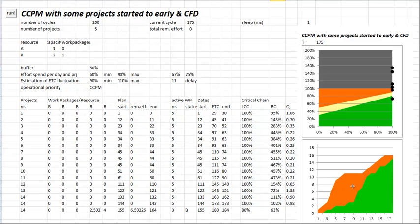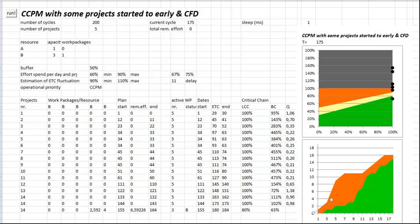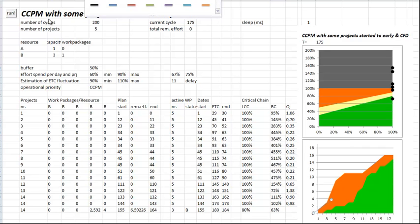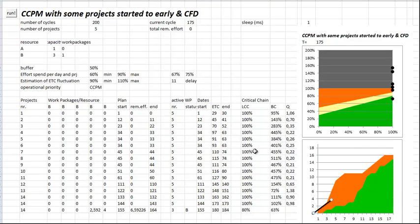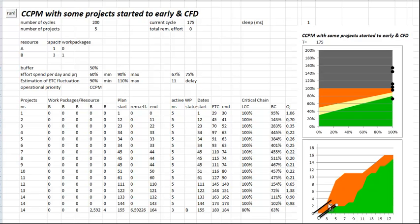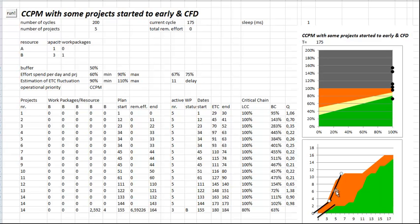Normally you do it really like this: you paint in such a continuous flow diagram some lines. In a good continuous flow diagram you have a line like this that is the inflow line and you have the outflow line, and they have to be parallel.